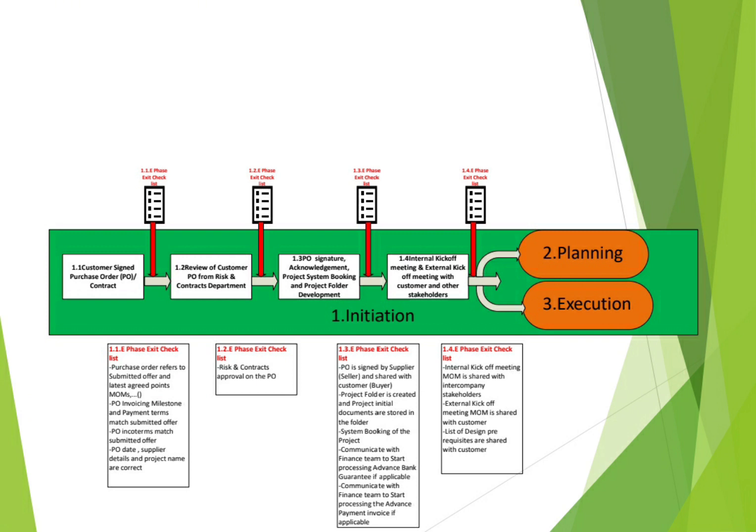The project folder is created and all the tender documents are stored in this project folder, or request for quotation, your supplier quotations which you will need during the project execution, any minutes of meeting, your technical offer, your commercial offer, all of this needs to be stored in the project folder.